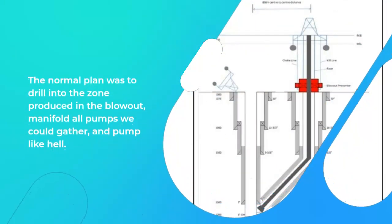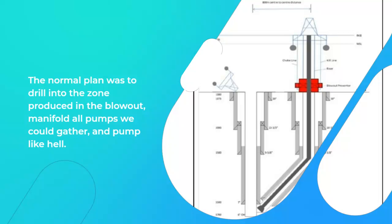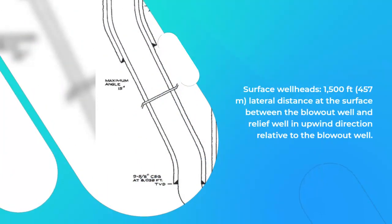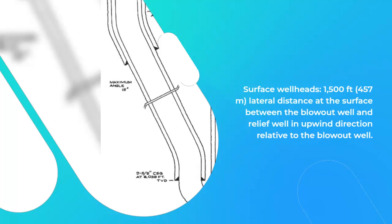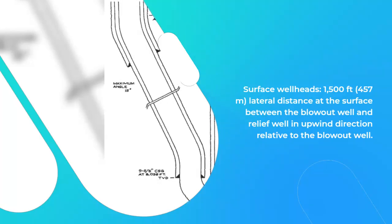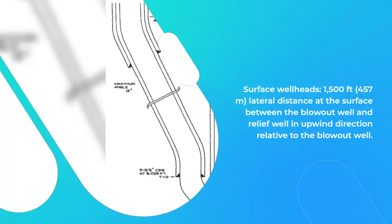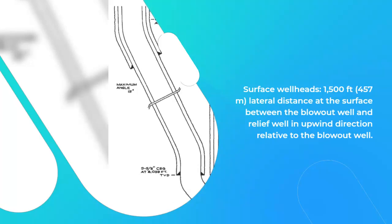The normal plan was to drill into the zone produced in the blowout, manifold all pumps we could gather, and pump at maximum rate. For surface wellheads, a lateral distance of 1,500 feet (457 meters) is required at the surface between the blowout well and relief well, in the upwind direction relative to the blowout well.